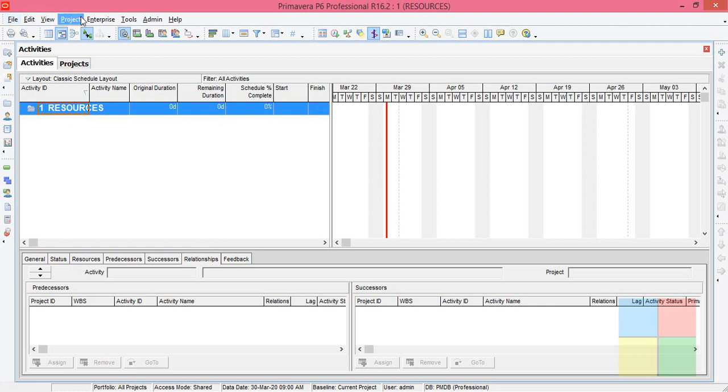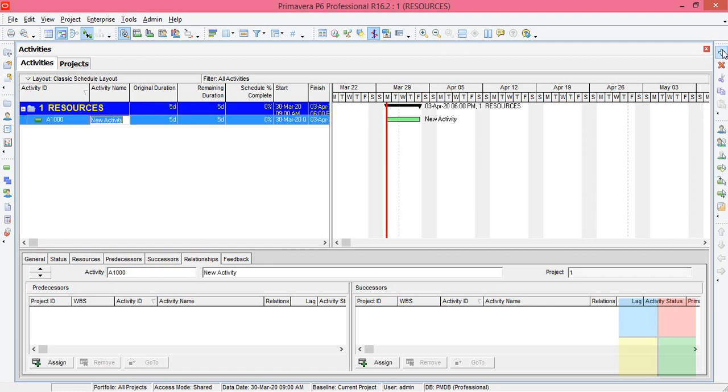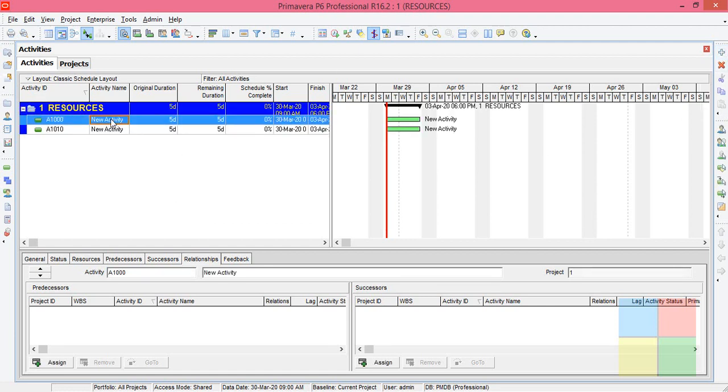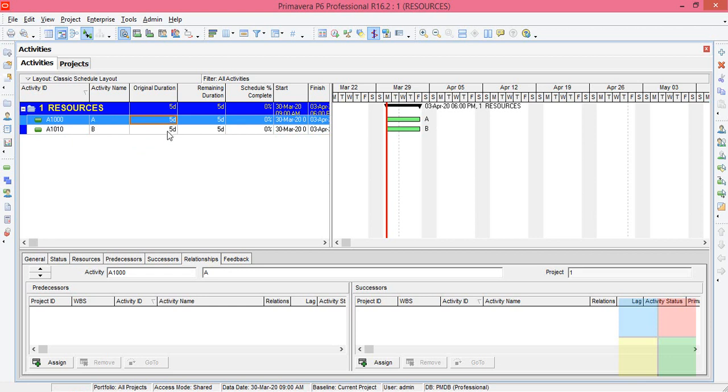Since we don't want WBS, we'll continue. I'll add two activities, one, two. I'll rename it to A and B. Let the duration be five days each.